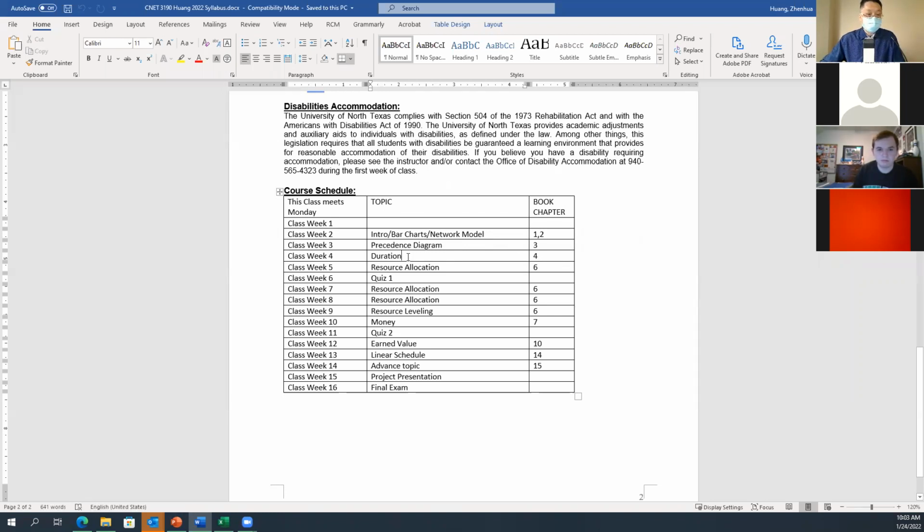This means estimating individual activities' durations based upon previous working experience and my company's historical productivity data. Then we estimate the duration for the new project.